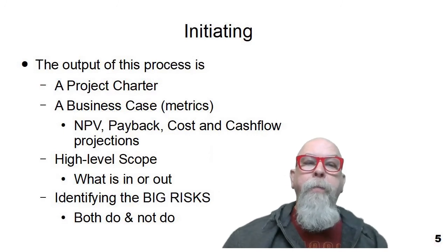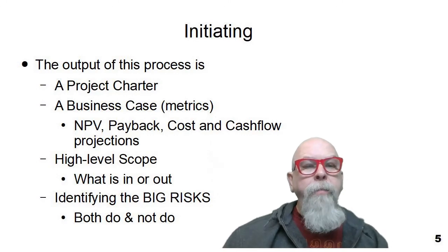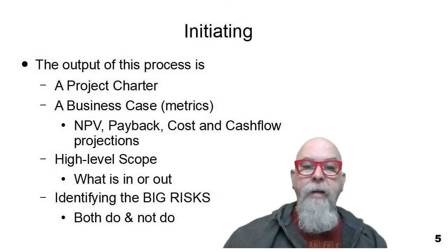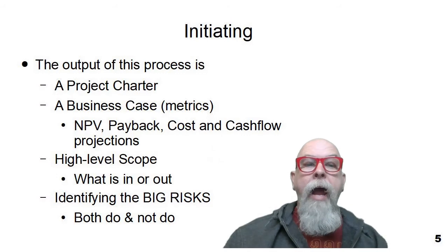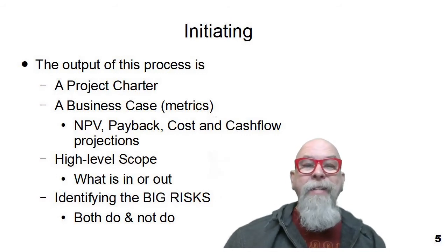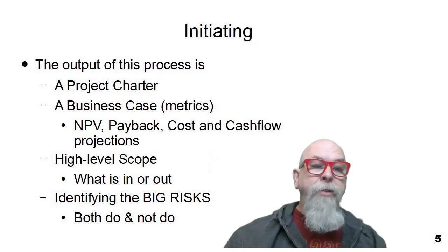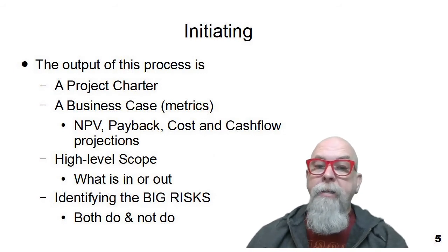Let's look at the first process group, initiating. The output of the initiating process is a project charter, and we'll define a project charter in a subsequent video. With the project charter, we're also going to see a business case or metrics that we're going to use to show that the project is a good business decision.